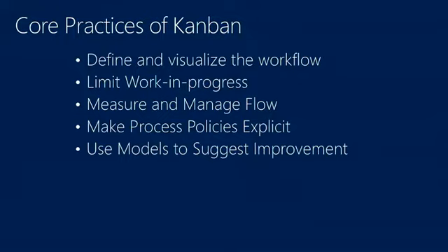So I make the argument we can do the same thing. We can have small, medium, and large. And a small goes through the system, let's say in 24 hours. A medium goes through the system in, let's just say, 48 hours, and a large goes through the system in 72 hours. And we pull these items through the system based on demand.